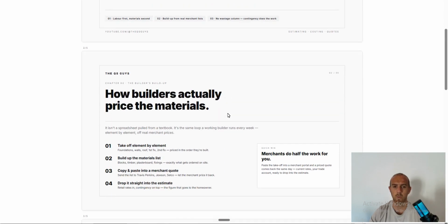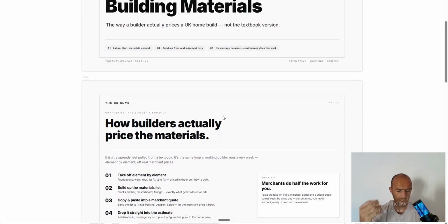The easiest way to work out your materials, guys, when you're doing demolition, when you're doing labor, when you're doing installs, let's say you're starting to build and stand frames. Mark out frame lines. Cool. How many linear meters of bottom plate do we have? That's how we're going to work out our framing. Now, for a standard 2.4 stud height, if we're working out, say, 50 to 60 linear meters of bottom plate area, times that by 10, that gives you all your studs at 400 millimeters and gives you all your nogs at whatever that is, 850 mil high and 1.5 meters high.